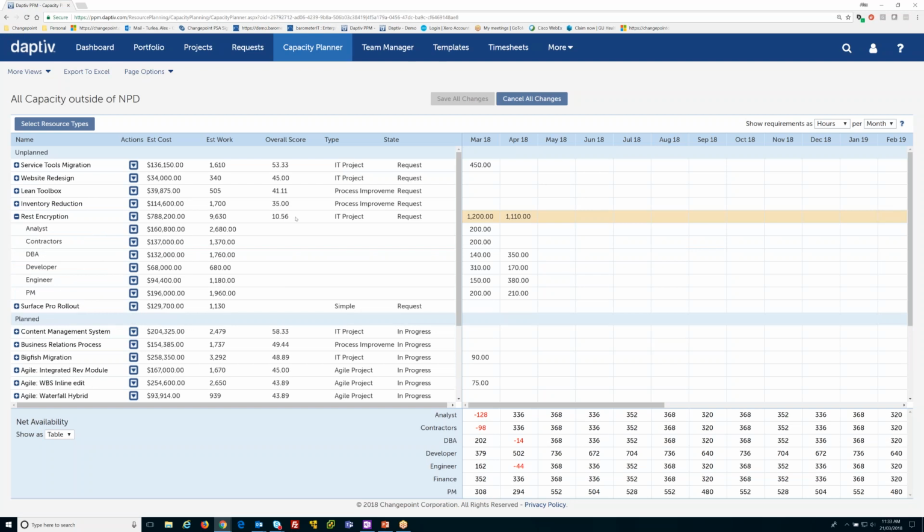And secondly, it is the lowest scored priority on our pipeline list here. So this would be a candidate to remove if we wanted to. So I'm going to do that first. I'm going to remove it. Right away, it gets grayed out and taken out of this calculation. And you can see now at the bottom, we don't have any more resource constraints. Once we remove this project from our portfolio or this request, we can take on the rest of the pipeline projects without any issue whatsoever.